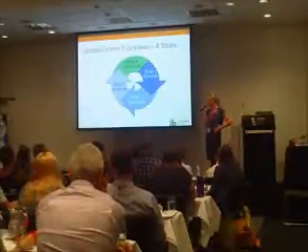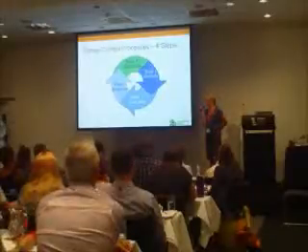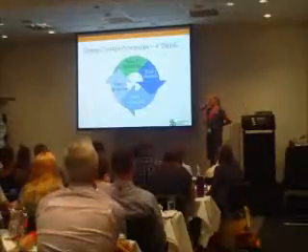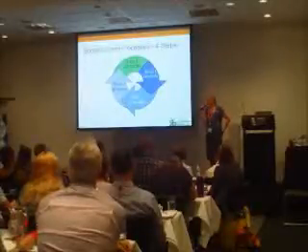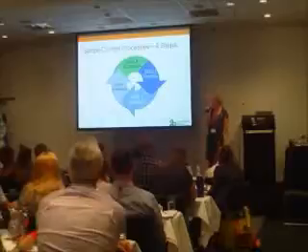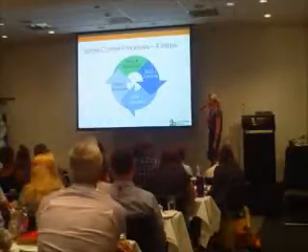So, if you've made a mistake in your work, you may well have to bear the cost of that. But if it's caused by a lack of information or lack of disclosure or someone changing their mind, they then have to bear the cost for that. So that would be part of getting your variation approved. And we've got some templates we'll look at shortly.